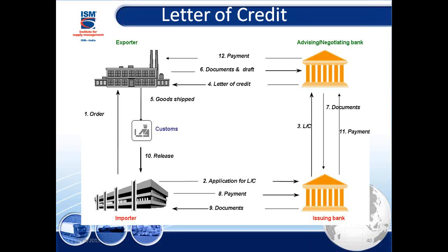Now the things are being done. The guy has done the goods, the documents, the things around. So when the goods are shipped, then I do the payments part, and when the payments are gone, this is how the cycle goes on. So in short, the supplier is assured by their bank through our bank that the day the shipping documents come, and if they comply with the requirements spelled out in the bidding, the purchase order and the LC, they are bound to get the payments. So then the payment goes.